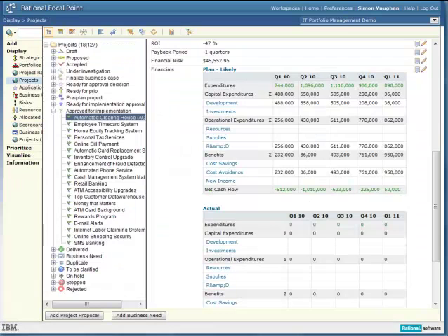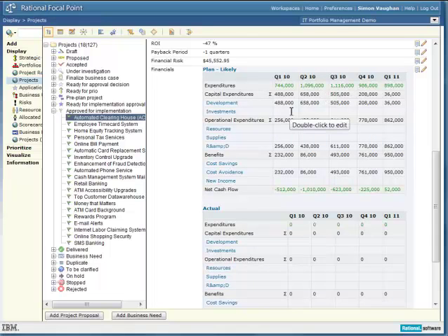The third technique is where we use known quantitative data from the business case. So this is information about the potential costs and the potential benefits in order to use that as input for prioritization. One of the challenges that we have around this is that when we look further into the future, some of the projections about those costs and about those benefits have a certain amount of uncertainty.